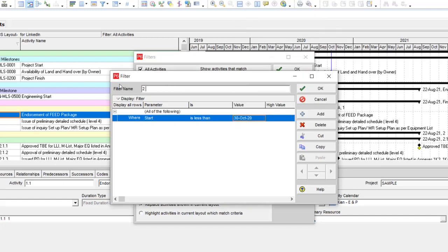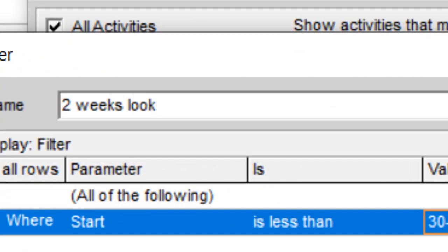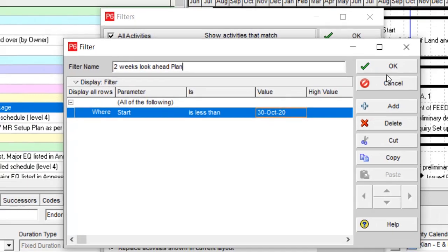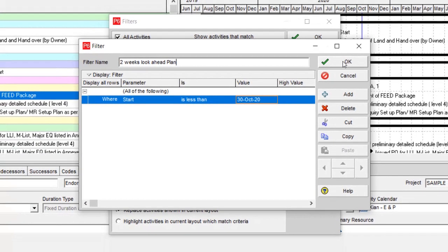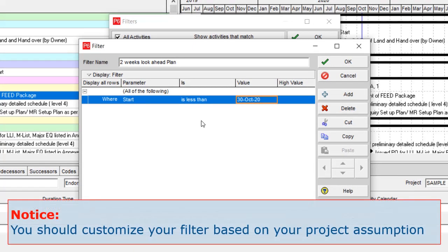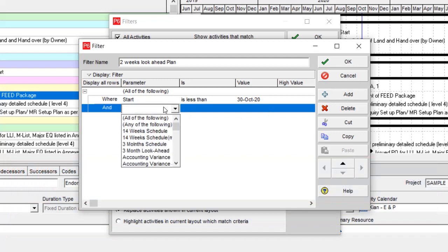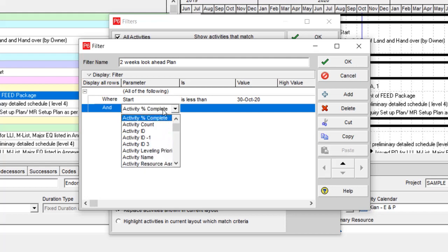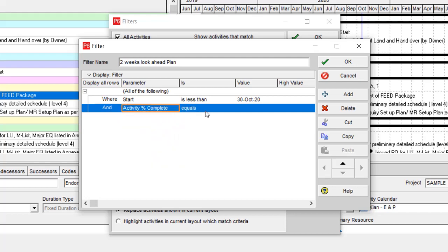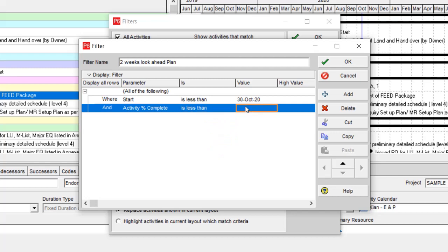The next criterion is to avoid any activities which are completed before. So activity percent completed is not equal to 100, meaning it's less than 100 percent.